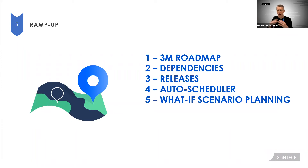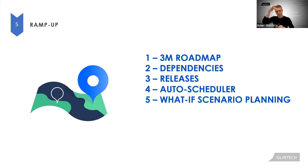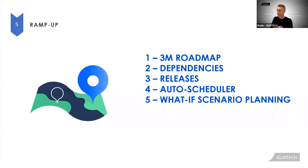Once you've got that right, great — introduce dependencies. Add your dependencies in there. What issues are blocking what other issues? Are any of those dependencies red? Filter your plan by red dependencies and make sure you have a conversation with the person who's doing the work that blocks the other one. Make sure there are no red dependencies.